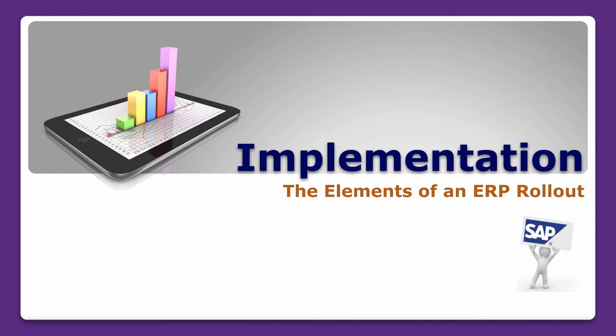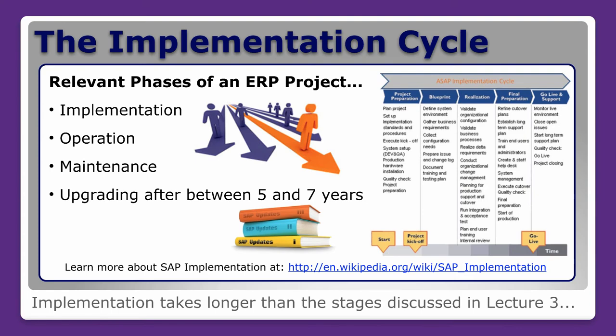The first step is to look at the elements of an ERP rollout. Here we have the implementation cycle. Implementation, operation and maintenance generally involves an upgrade of most systems between five and seven years from when the system was first put in. On the right-hand side you can see the ASAP implementation cycle, which consists of project preparation, blueprinting, realization, final preparation, and go live and support.